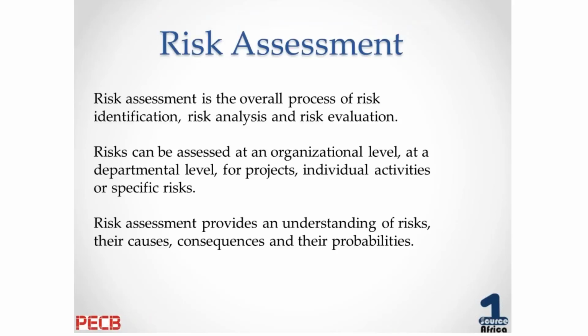So risk assessment is the overall process of risk identification, risk analysis, and risk evaluation. And risks can be assessed at an organizational level, department level, projects, individual activities, or specific risks related to specific objectives. Risk assessment provides an understanding of risk, their causes, consequences, and their probabilities.